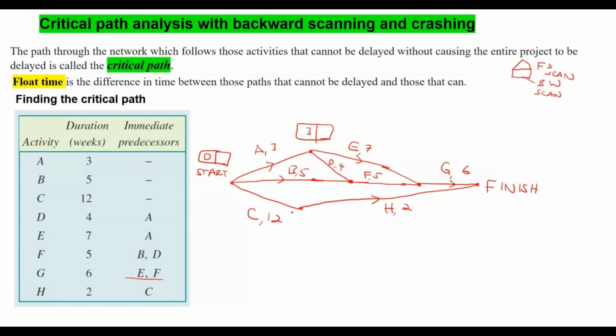And if you come this way here, if we put another rectangle there, and this is going to be 12. Another one up there. So now at this junction, at that node, there are 2 edges. So you could come this way, which is 3, 3 plus 4 is 7, or you can come this way direct, which is 5. You take the bigger number. So in this case, 7 is the bigger number. So we put another rectangle here, and another one with our finish line.